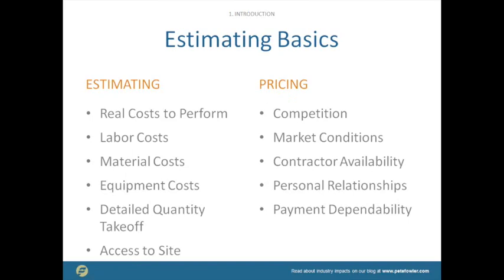I'm going to say that again, because this is important. I'm going to talk to you about estimating, but when you're budgeting, a budget is what you're actually going to pay, because sometimes there's a big difference between the estimate and the price, right? So if market conditions are hot, and there's a lot of construction going on, prices are going up, right? Labor costs are going up, material costs are going up, equipment costs are going up. That's just part of the program.